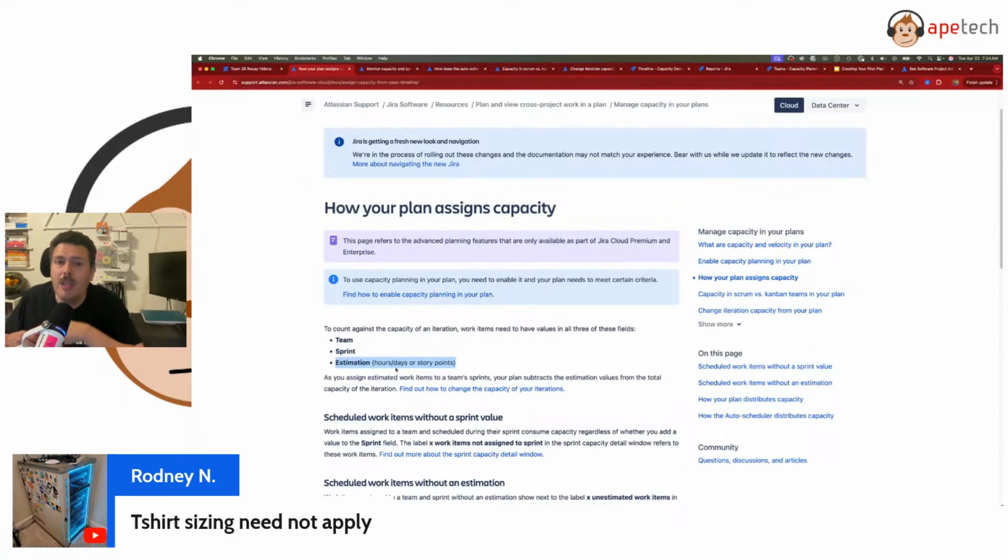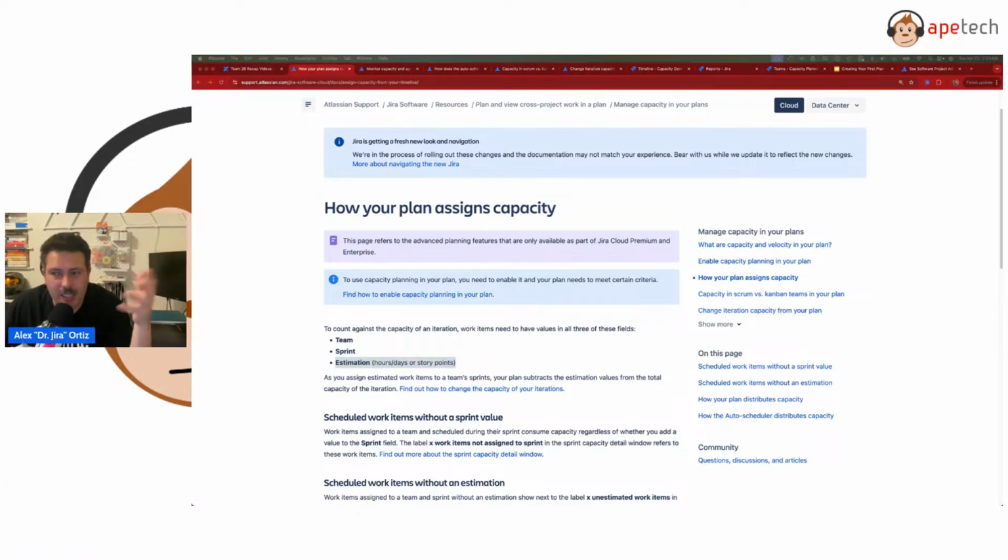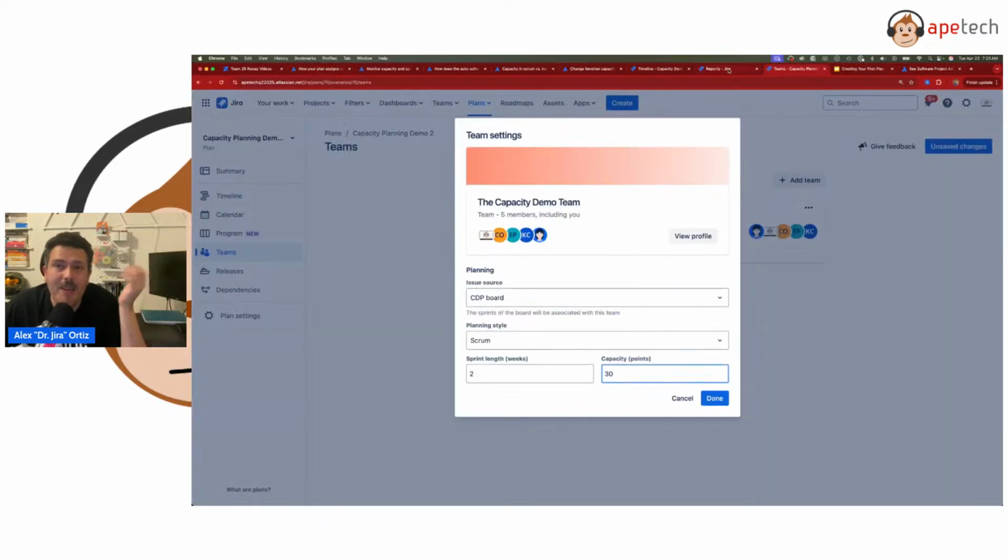And if they do, internally, not every team uses the same value for story points. So somebody's velocity of 1,000 might be the same as somebody's velocity of 100, because it's relative, right? And again, I don't like the idea of it just because there are so many variables, so much uncertainty, and so much flexibility that it's hard to have a defined process. But again, I'm here to show you the best way to do it, but we'll see.